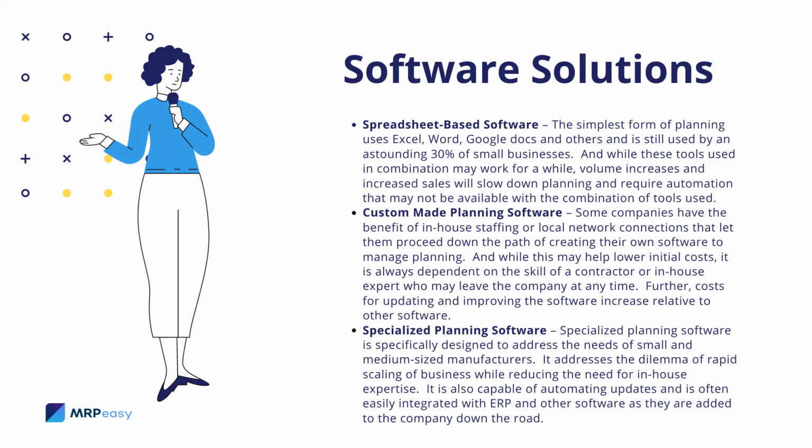Custom-made planning software. Some companies have the benefit of in-house staffing or local network connections that let them proceed down the path of creating their own software to manage planning. And while this may help lower initial costs, it is always dependent on the skill of a contractor or in-house expert who may leave the company at any time. Further, costs for updating and improving the software increase relative to other software.